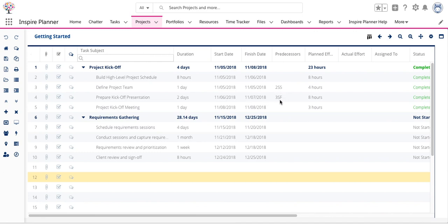And then the next predecessor that we have set is for the task in row 4. We've defined the task in row 3 as the predecessor and the type of relationship is start to finish SF.